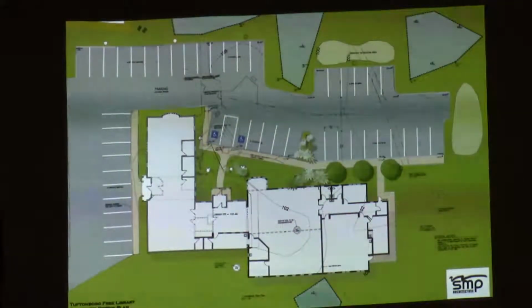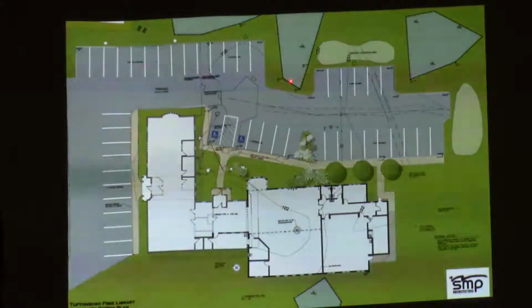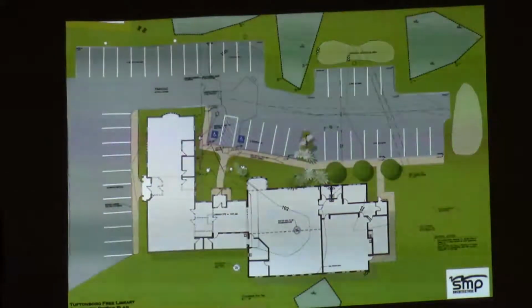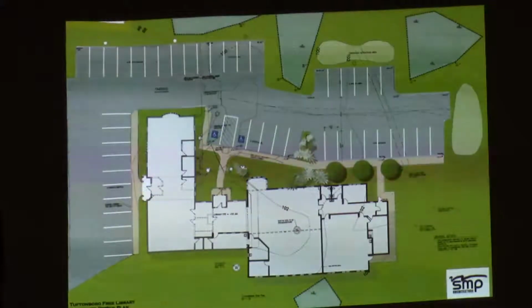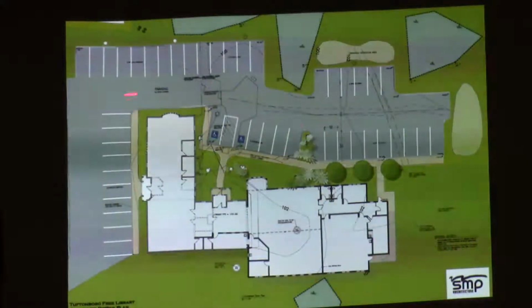So a lot of the concerns that the community had previously about not being able to utilize the space were because of that data. So we worked right around the areas that are known to be damp, and then we've got retention pond locations for the civil engineer to utilize, because we know that it's going to sheet drain and we need to be able to manage that water on site. We haven't had our civil engineer begin any analysis yet because we're still in the conceptual stage. When it passes, then we'll get North Branch here to look at things deeper. But right now, we are able to maintain entry in, add some additional parking, and work within the areas between the known wetlands.